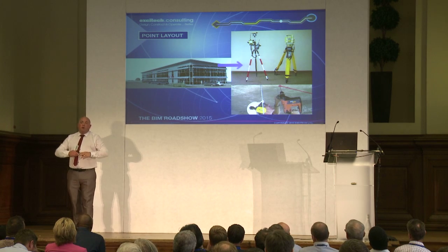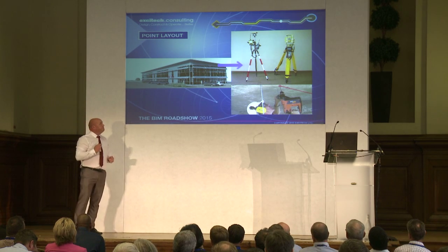I can start putting the fixings into the precast concrete and stuff. I can start drilling the holes to host all the services that are going to come on site, knowing that it's going to be correct. And it's giving me confidence. So hopefully that's going to help me deliver and meet this very, very tight time scale I've got, because of the amount of pre-work I can do before things are delivered on site.